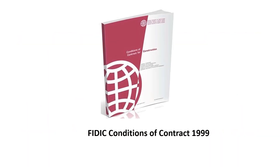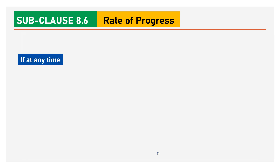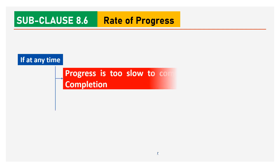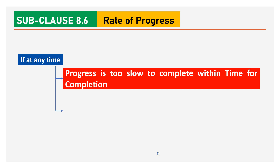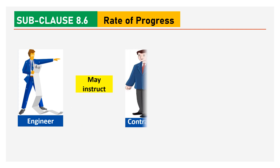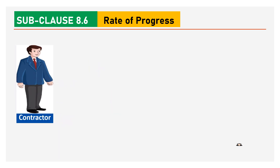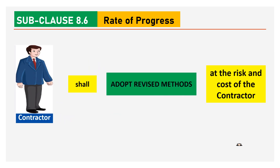Now let us see what remedy is provided under FIDIC conditions of contract 1999 edition. Under FIDIC 99 edition, subclause 8.6 deals with rate of progress. This subclause provides that at any time during construction, if progress is too slow that the project cannot be completed within the time for completion, and/or progress has fallen or will fall behind the program submitted under subclause 8.3, the engineer may instruct the contractor to submit a revised program under subclause 8.3 describing the methods to complete the works within the time for completion.